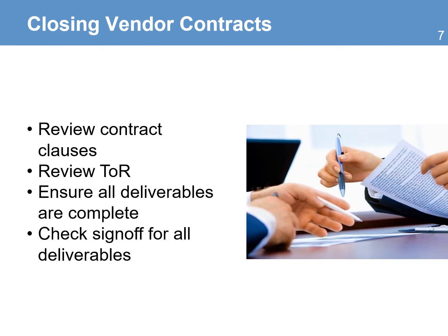Closing vendor contract is the review of the contract clauses that you have with different vendors and ensure their services have been completed as required. You need to review the terms of reference to make sure that you are not missing anything important. Sometimes there will be a final report or a final deliverable that the vendor or consultant needs to provide. Ensure that all deliverables are complete and there has been a formal sign-off on all vendor deliverables. That means there is nothing else standing or pending with the vendors before you authorize the final payment.